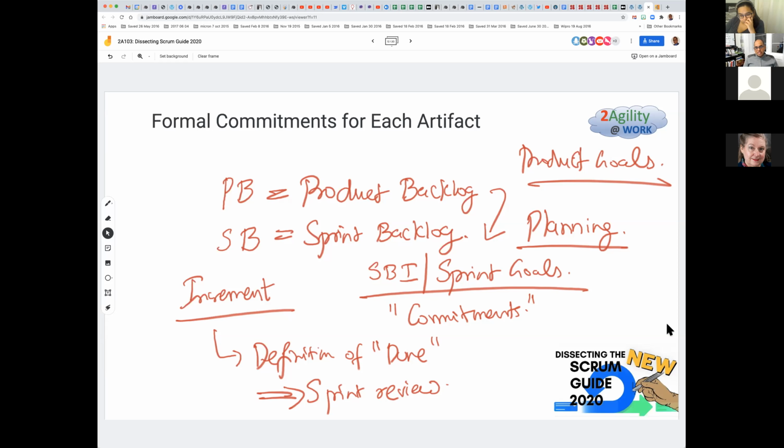In that case the product goals are the objectives, and then we break it down into smaller goals: in the next 2 or 3 weeks, our goal in the context of the larger goal is to do these sprint backlog items, which we took from the product backlog. The theme of the sprint goal is that these items constitute a portion of the product goal.